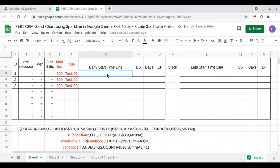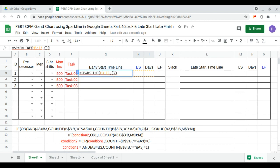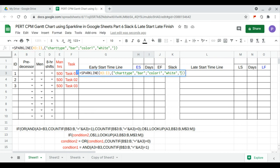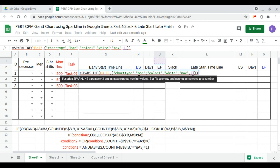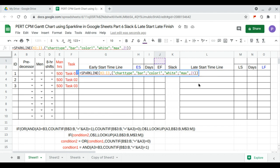We continue with the early start timeline, which is equal to a sparkline of start and duration. The options are: first, the chart type will be bar; second, color one will be white; and third, the maximum will be the maximum of J1, with the reference locked because we're dragging this formula downwards along the column.